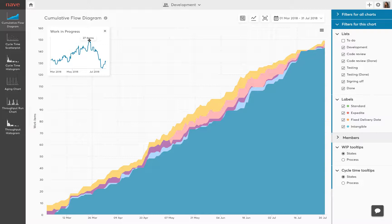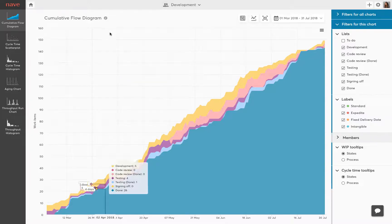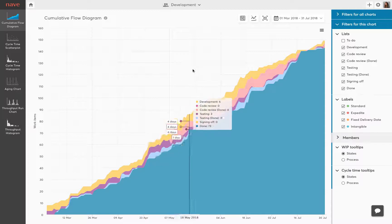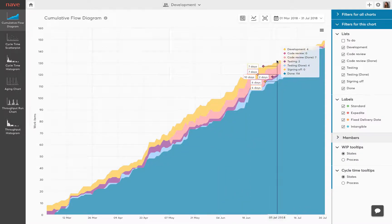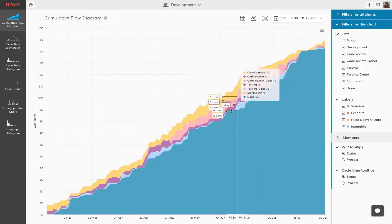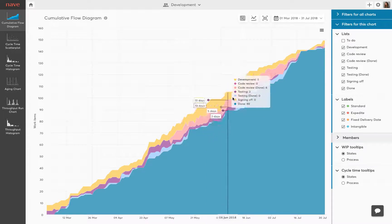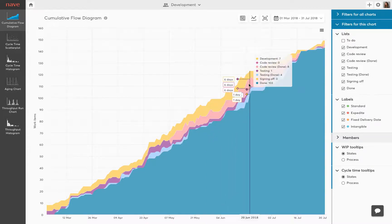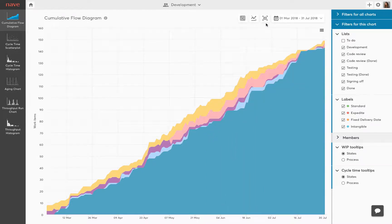Increased work in progress usually results in increased cycle times, reduced team efficiency and potential project delays. The cumulative flow diagram enables you to spot bottlenecks instantly. If one or more of the areas that represent work in progress start expanding, then it signifies a bottleneck in that state.